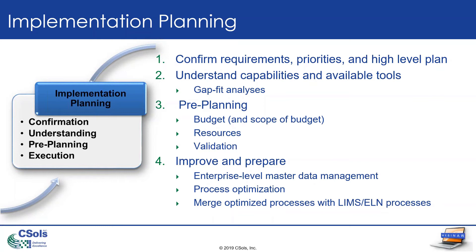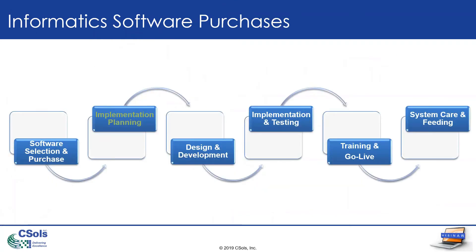As part of implementation planning we want to make sure we're on the same page with the rest of our stakeholders. We want to understand the capabilities and available tools. We're going to do some pre-planning including budgeting, resources, and planning for validation, and then we want to improve our systems and prepare for the actual implementation. The design and development step is where your LIMS or ELN vendor will come in, do additional requirements gathering, and start mapping out and customizing your system.